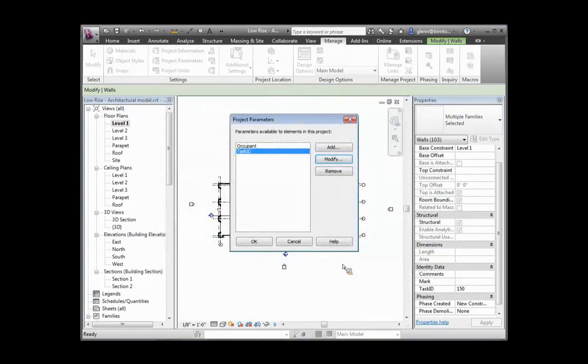What we're going to do is, over in Navisworks, take all those task IDs and say, grab all the 110s, grab all the 120s, and simulate those. Everything that didn't have a task ID just won't show up in the simulation. Okay, so that's sometimes a good thing, because then you can control what you show and what you don't show, or only choose some of the things to simulate. There's nothing that says you have to simulate all the things for that task ID, so you can choose that and control that a little bit.